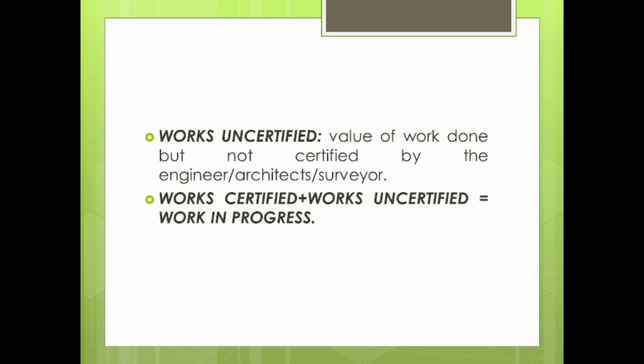Now let's move on. What is work uncertified then? Uncertified means the value of work done but not certified by the engineer or surveyor. So the engineer and surveyor have not certified that work for payment. So this amount of work is known as work uncertified.